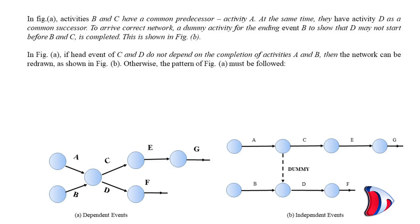To arrive at correct network, a dummy activity from the ending event B is used to show that D may not start before B and C is completed. This is shown in figure B. In figure A, if head event of C and D do not depend on the completion of activities A and B, then the network can be redrawn as shown in figure B. Otherwise the pattern of figure A must be followed.